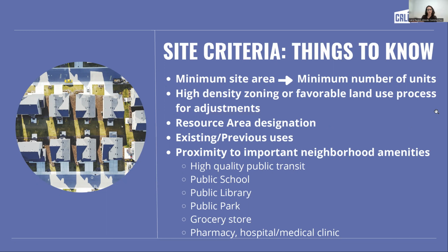And you'll have a calculator and maybe a little spreadsheet that helps you think about the average size of the units that you want to build. If you're doing a blend of, say, 1 bedroom, 2 bedroom, and 3 bedroom, you'll have an average across that unit spectrum. If you know you're just going to do a senior housing project, you probably have a really strong sense that they're all going to be maybe 1 bedroom units, for example, and you have a typical unit size for that. Understanding some basic criteria about what you plan to build is helpful in getting into the calculation of what you can fit on that site.